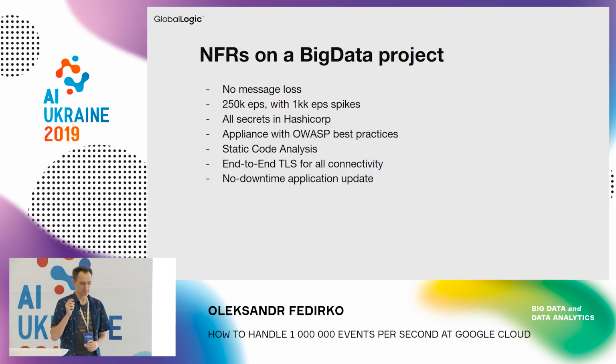NFRs. Some NFRs, if you don't take them in the very beginning of the project and you just face them in the middle, could hit you really hard. Such NFRs were described like no message loss at every component, performance, of course, and secrets, how to store secrets, how to follow best practices, how your code has to pass every static code analysis.